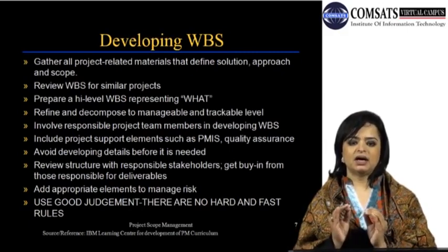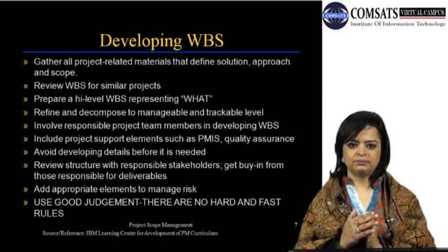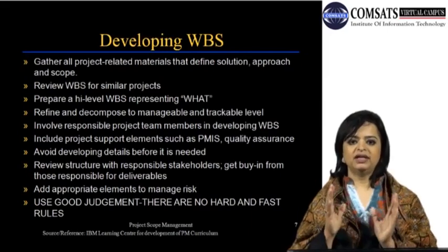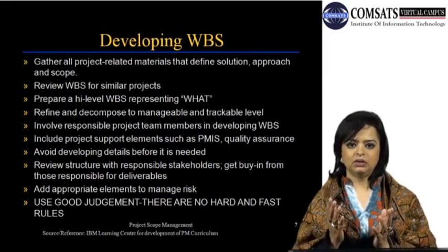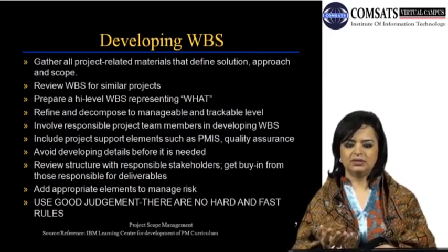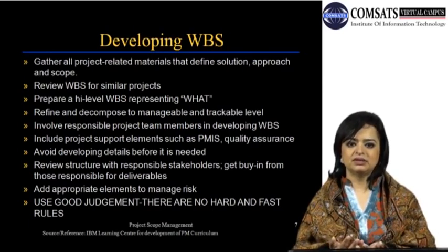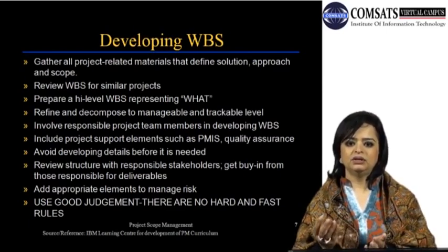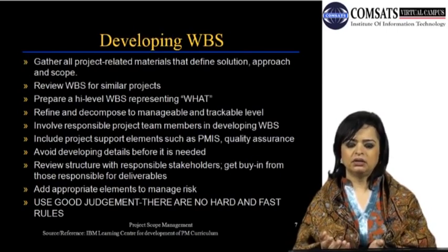The best WBS are created in a stepwise fashion. That means you create a very high level framework. So if you're planning a country, you define a country, then the provinces or the states, then the cities. Within the cities, you define a library, a mosque, a school, a hospital.